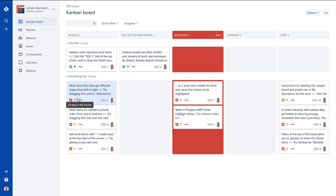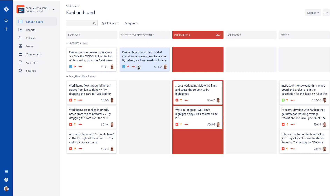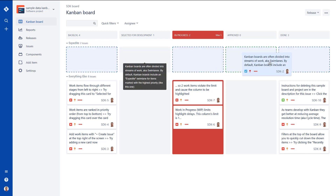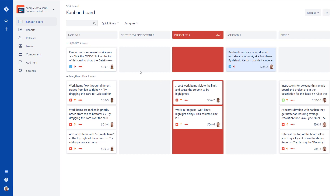Those dots — if issues have been sitting there for a very long time you can see a lot of them: 'no update done for 23 days.' Jira indicates that visually, which is pretty cool. But there's no built-in rule to automatically move something to Blocked or Done in Kanban. However, if you have Service Desk, it is possible — for instance, if there's no response on a ticket for seven or eight days, you can set automation to move that issue to Done or something similar. I hope that's going to help you a lot. Please don't forget to subscribe to my channel — a few new videos are coming soon. Thank you for watching!